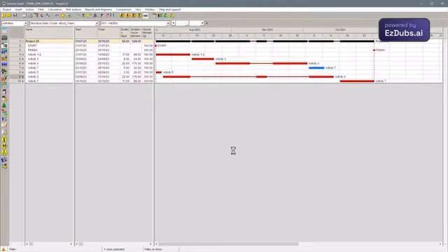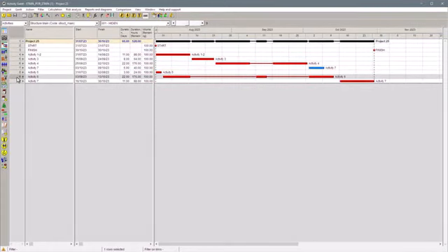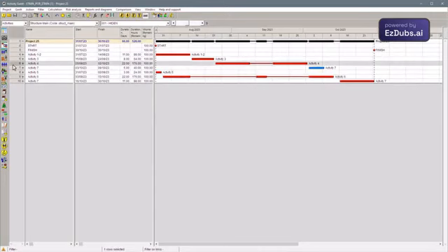The first is for reality to be presented in our work. Not because of the CPM methodology, but because of the principle of doing it as quickly and as soon as possible. However, respecting the resources, which are rare, that it is not possible to acquire new ones simply for having financial resources. And the resource of programming my activity with a stop at 50%, and restart in 5 days, or stop at 10%, restart in 5 days, production for another 20, stop for another 5 days, and so I model.